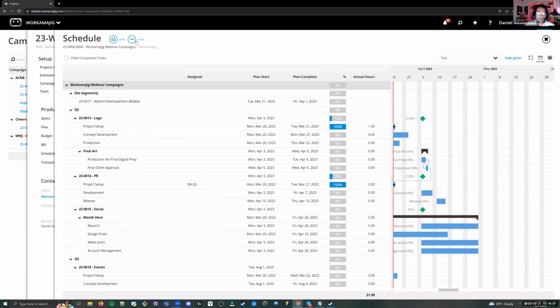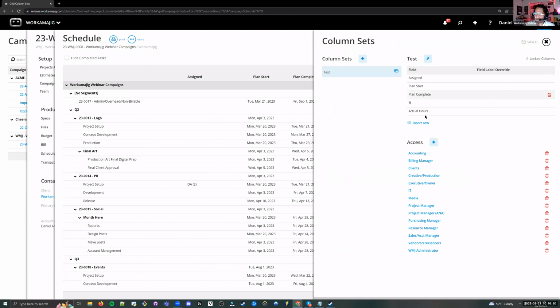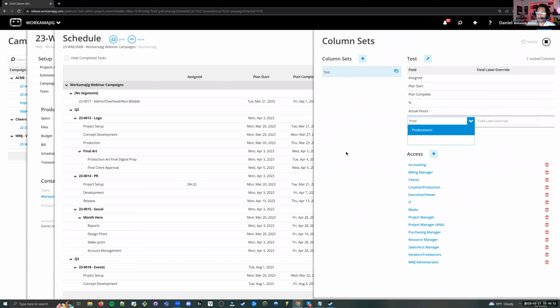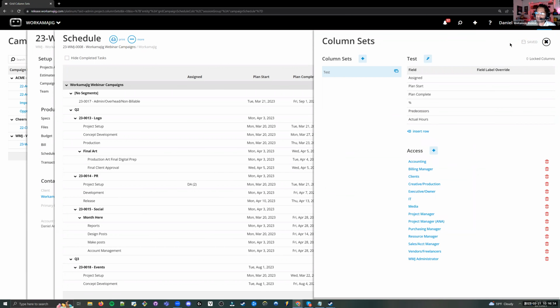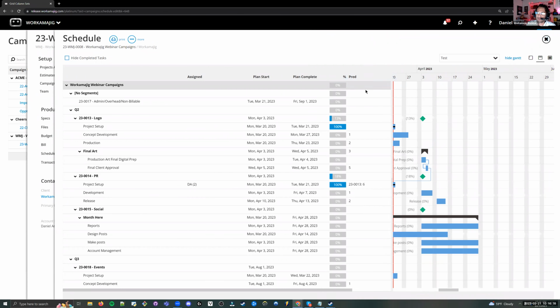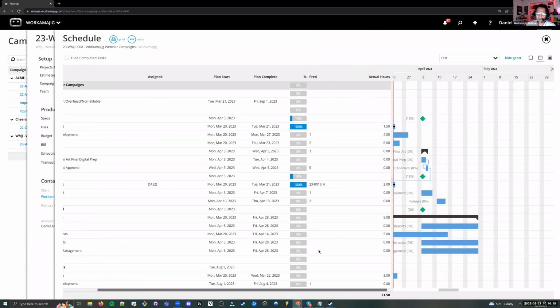And so when we're looking at the predecessor for it, and sorry, I'm going to click around for just a second, you'll see these cross-project predecessors when they're represented like this. We always show them like this. We show the project number first and then the task line that it's waiting for afterwards. You can definitely get yourself into some trouble for this here if you make circular references and things like that.